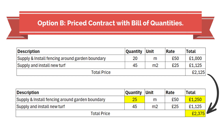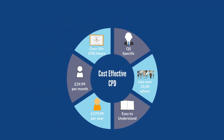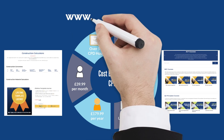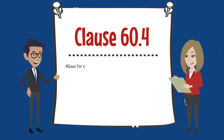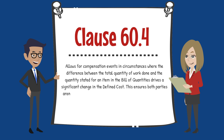Well, not always. Clause 60.4 allows for compensation events in circumstances where the difference between the total quantity of work done and the quantity stated for an item in the bill of quantities drives a significant change in the defined cost. This ensures both parties aren't tied to a rate that no longer reflects the reality on site.